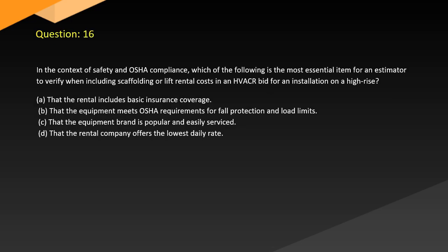Question 16. In the context of safety and OSHA compliance, which of the following is the most essential item for an estimator to verify when including scaffolding or lift rental costs in an HVACR bid for an installation on a high-rise? A, that the rental includes basic insurance coverage. B, that the equipment meets OSHA requirements for fall protection and load limits. C, that the equipment brand is popular and easily serviced. D, that the rental company offers the lowest daily rate.